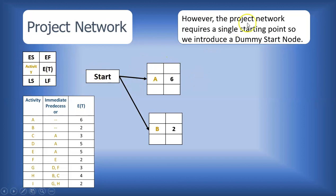You will note that the project network requires a single starting point. So since we had both activities A and B just hanging in at the start of the network, we introduce what we call a dummy start node. And the purpose of this dummy start node is just to create that single, unique starting point for a project.